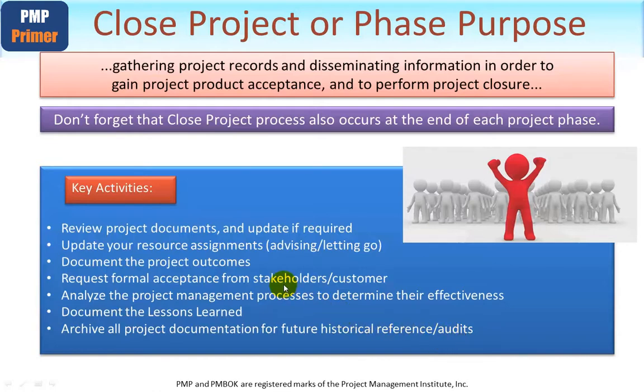For example, you wouldn't have acceptance of handing over the end product, but you'd as a minimum need acceptance from your customer or users that it's the right thing to do and that they will now no longer have the end product. You might want to add to this some form of plan because, of course, if you've got products which are partway complete and you've decided to shut the project down, they are still assets and you may want to, in some way, make them more valuable to your company. I imagine if you were building an office block and the bank pulled the plug and now you've got a building site with lots of building materials and expensive plant on it, well, you'd want to make that site safe. You might want to sell it off, at least to refurbish your costs for the investment in the site. You might want to sell off the materials and equipment and so on and so forth.